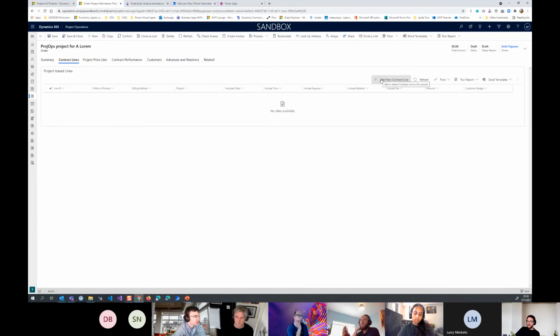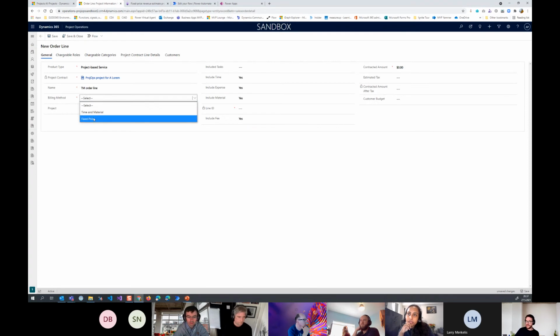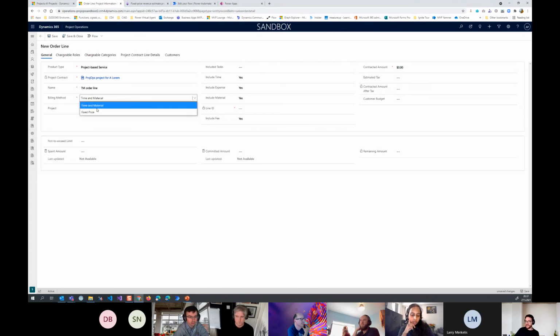So moving on, what I'm going to do next is, for that signed order, we've defined that the implementation for Alorem is time and material based. Order line. Having trouble talking and typing at the same time. The two possibilities that we have are T&M and fixed price. The order line that we're creating defines whether the project that we're running is based on a fixed price or a time and material component.